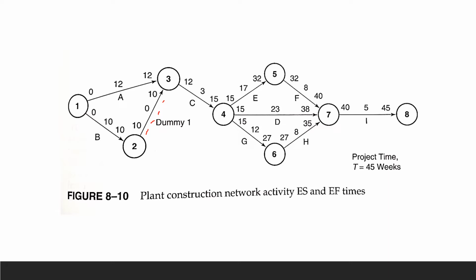So make sure you know the backwards and the forward: the earliest for forward, and the latest for your backwards. You have to get that. So altogether, when you add everything up, you're going to get 45 weeks. You can see the largest right past your note, and you get 45 ending right here at note 8. So that's the end of your project, and we spent altogether 45 weeks. So here I'm going to circle that so you can see the totals for each.